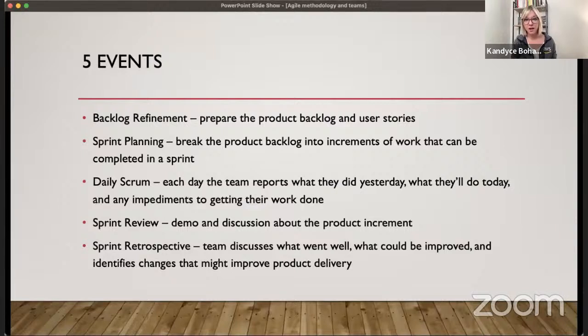Each day, the Scrum Master is going to lead the daily Scrum. This is a super short meeting. It's sometimes called a stand-up because you want to stand up so it doesn't take too long. It should be 15 minutes max. And every day the team comes in and says, what did they do yesterday? So I completed the API layer on this particular method. What am I going to do today?